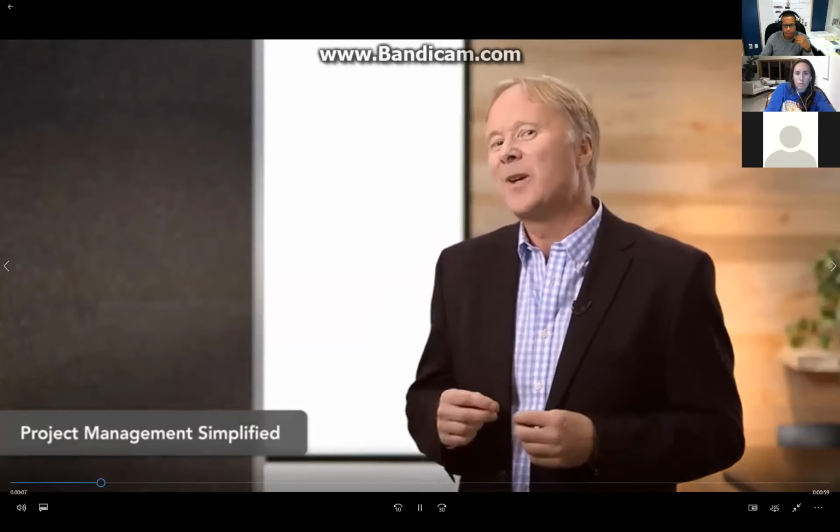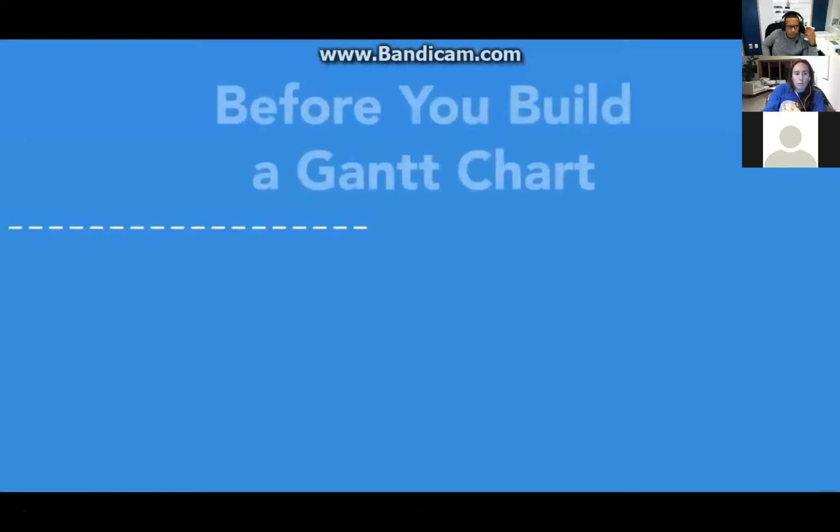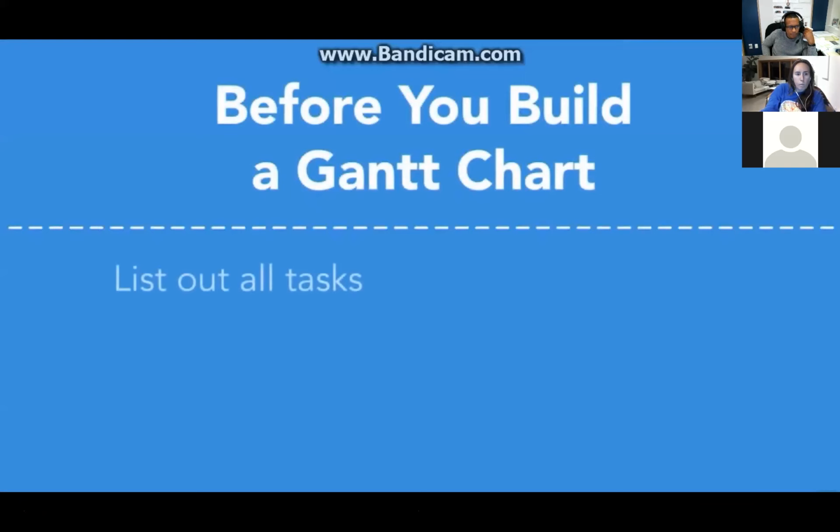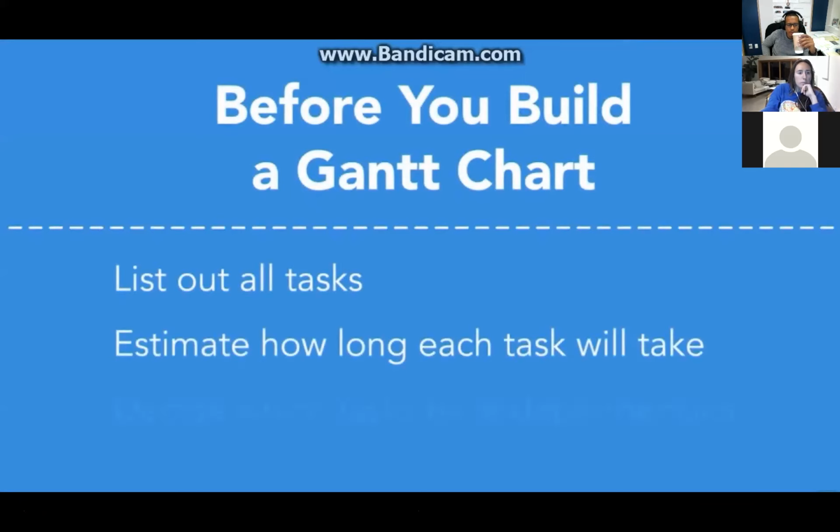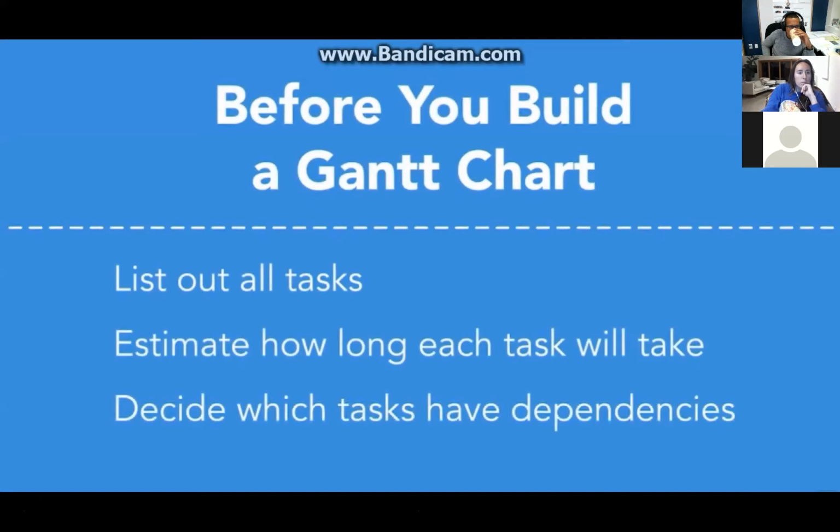Where I explain how Gantt charts fit into the larger scheme of project management. They are in fact step 6 of my 12-step process, because before you can construct one, you need to have listed out all of your tasks, estimated how long they will take, and decided on which ones depend on which other ones. But if you already know about that and you just want to get better at the Gantt side of things, then feel free to plunge straight into this course.